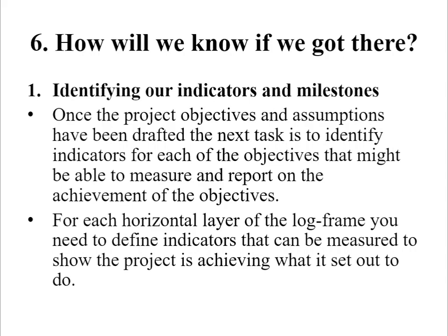Question number 6 is, how will we know if we have got there? Here, the focus will be on the milestones and indicators, just to know if we are on target. Once the project objectives and assumptions have been drafted, the next task is to identify indicators for each of the objectives that might be able to measure and report on the achievement of the objectives. So, for each horizontal layer of the log frame, you need to define indicators that can be measured to show the project is achieving what it set out to do.